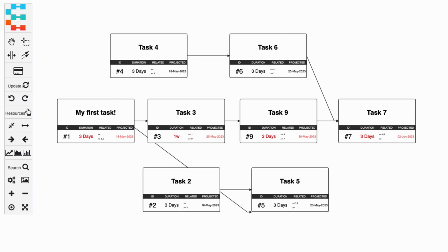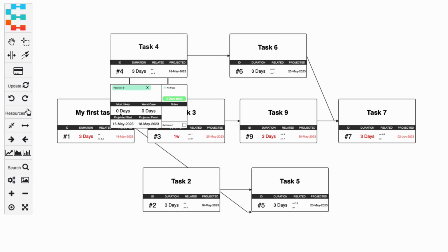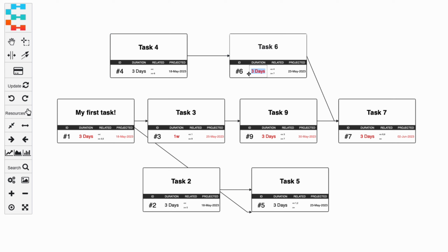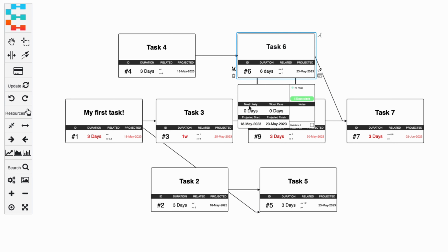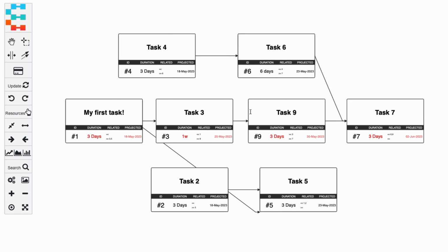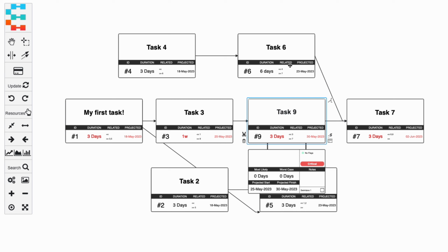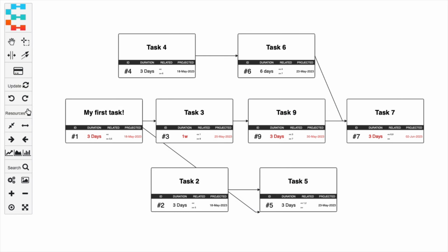The most likely and worst case durations are used for various project calculations, including buffered end dates, fever chart progress calculations, and for Monte Carlo simulations. You don't have to enter this for every task. If these are left at the default 0 days, Energer uses the default multipliers specified in your project settings. For instance, if this task is 6 days long, leaving the most likely field empty will use the 1.25 multiplier. So we'll assume that this task's most likely duration is 7.5 days. Similarly, the worst case duration would be treated as 12, which is 2 times.